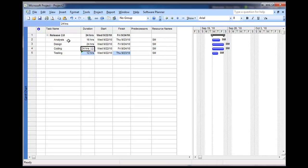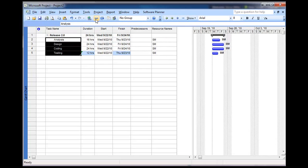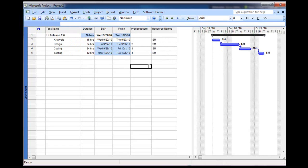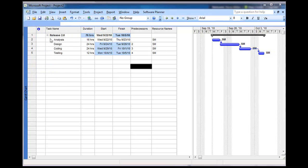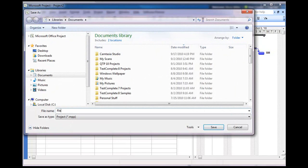And maybe I want to set some predecessors up. I can also do that as well. I can link those together. All right, and it pushes out the dates. Now, at this point, I could save this locally. I'll just save this here as Release 2.0.